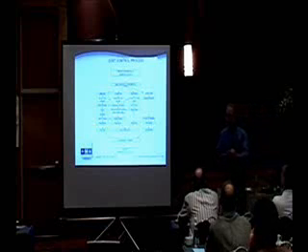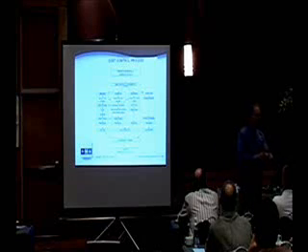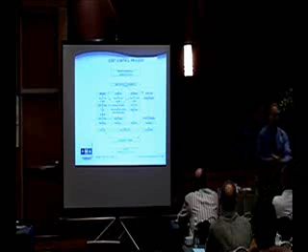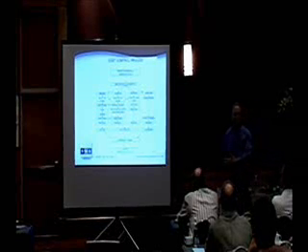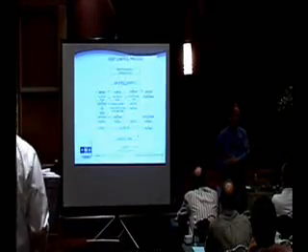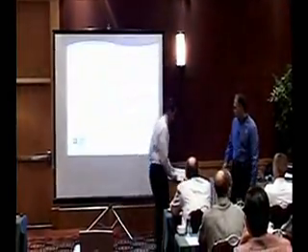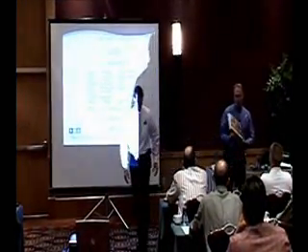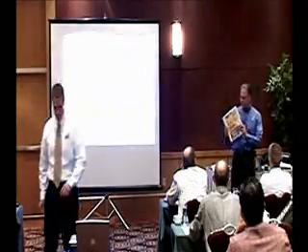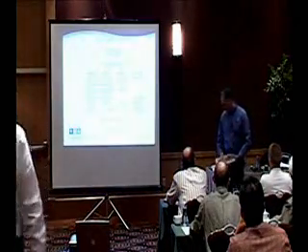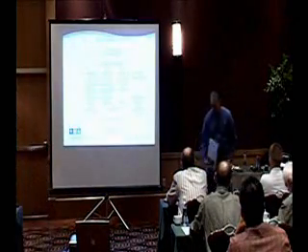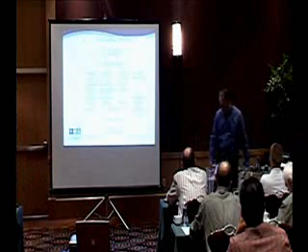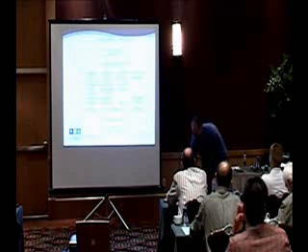If we say, well, this guy is cheaper, he only charges me $2.75 a square foot for whatever it is, and this guy's more expensive, it's $3 a square foot, it may not be an apples-to-apples comparison. Thank you. Absolutely true. Production manual. This one's got scopes of work in it that tells the labor guys what they're supposed to do. Others should have details of how things go together, pictorials, etc. You need to have that kind of information documented.